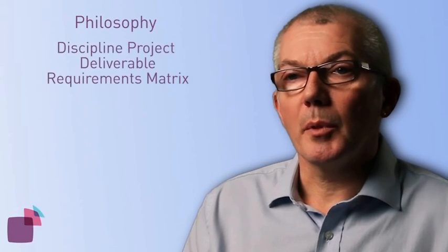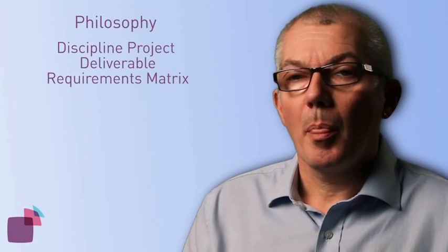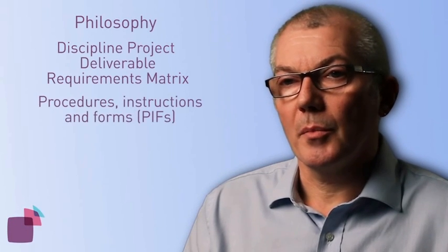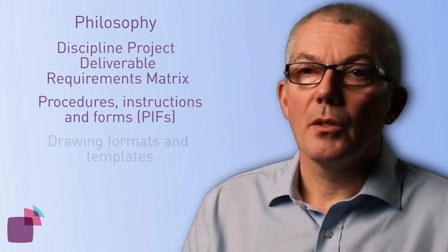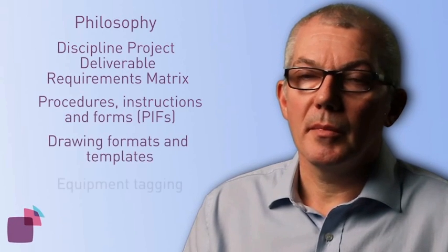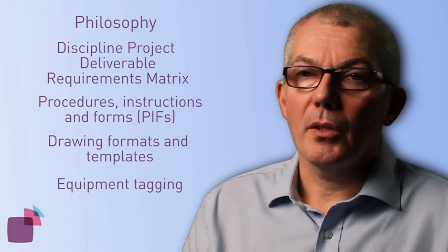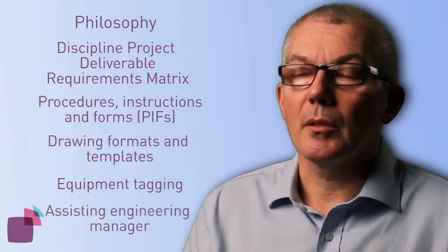It is important that the leads appreciate what their input to the PMP is. They provide input to such items as philosophy, discipline project deliverable requirements matrix, procedures, instructions and forms, or PIFs, drawing formats and templates, equipment tagging, and also assisting the engineering manager with Volume 2.